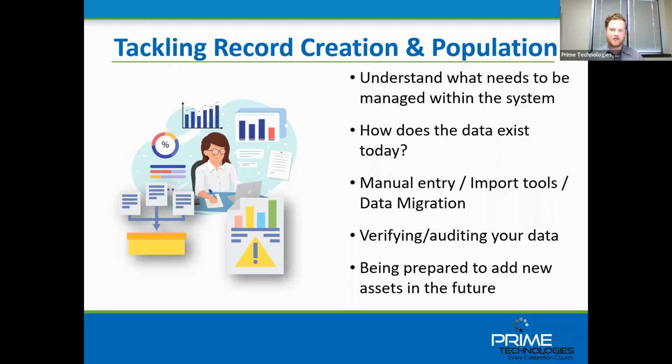So that can be a situation where we may do manual walk-downs and handle it in a specific way, versus you have the information on paper and we need to copy it in with a data entry specialist or some other manner. If you have it in Microsoft Excel, even greater, there are import tools for that. Or it's in some sort of legacy, we call it a soft format, some other database that'll be pulled in. But understanding how the data exists today is going to be important in figuring out what the next steps are going to be.